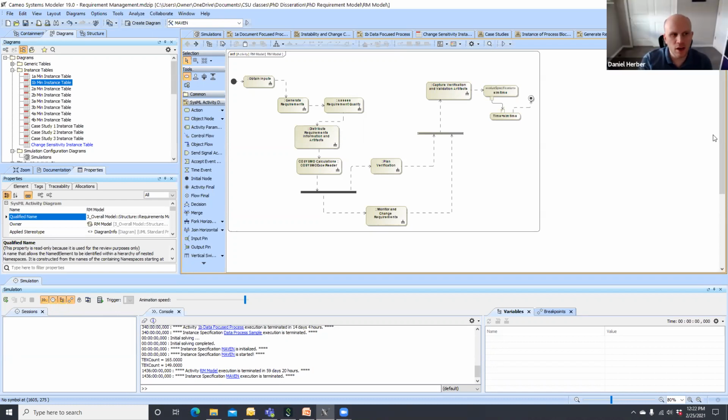Have you looked at incorporating any different types of uncertainty in the different elements, like a normal distribution, for example, if that's a good way to represent one part's uncertainty, rather than, I think right now it's a uniform distribution? I've seen Monte Carlo type simulations to get a better sense of the probability that the cost is above or below a threshold, not just the min and max that you may expect, but more of a probabilistic assessment, using more complex distributions to model the uncertainty in different parts of your model.